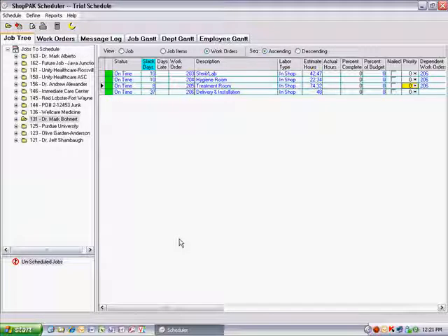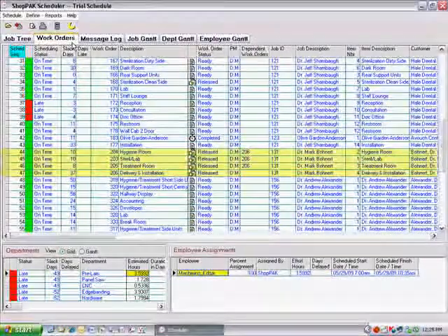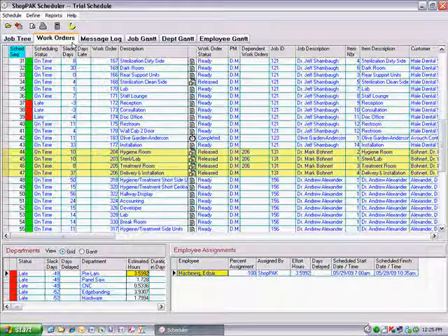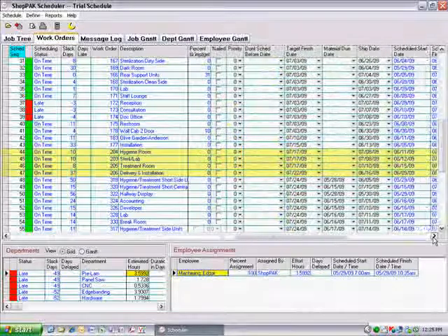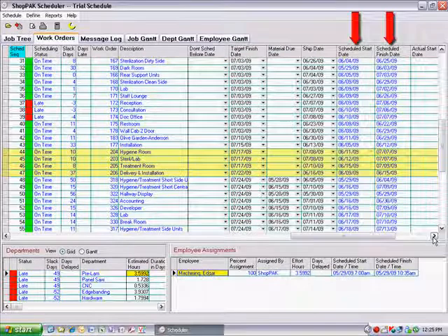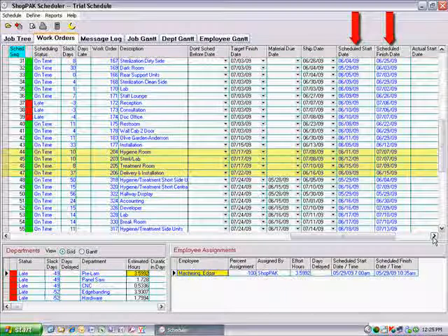When sequencing work orders, you'll need to make sure that the order supports any and all work order dependencies you've created. They don't necessarily need to immediately follow one another in the work order sequencing queue. But the relative order must be maintained because dependent work orders require their primary work order's scheduled finish date, which the scheduler uses as the dependent work order's earliest scheduling start date.